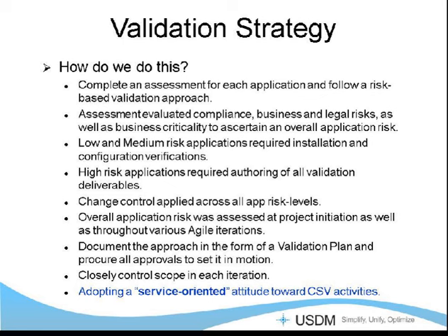And it was a matter of negotiation with the project team and with the business team to control that scope and make sure that we were able to deliver in the time that we were going to deliver. And we literally were looking at things like how critical is this that you have this functionality?